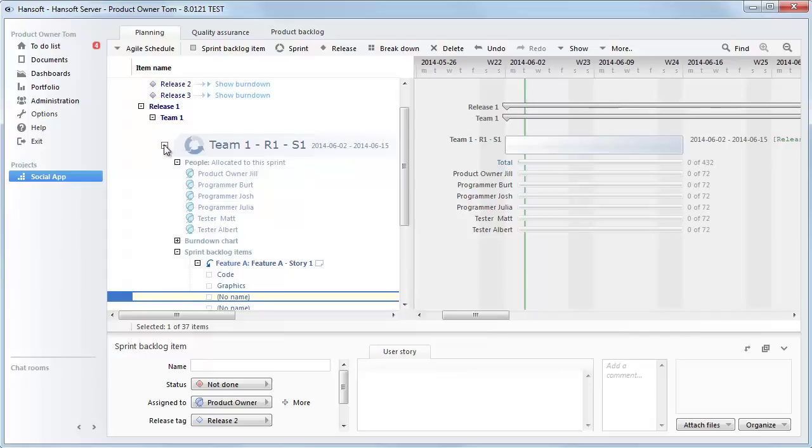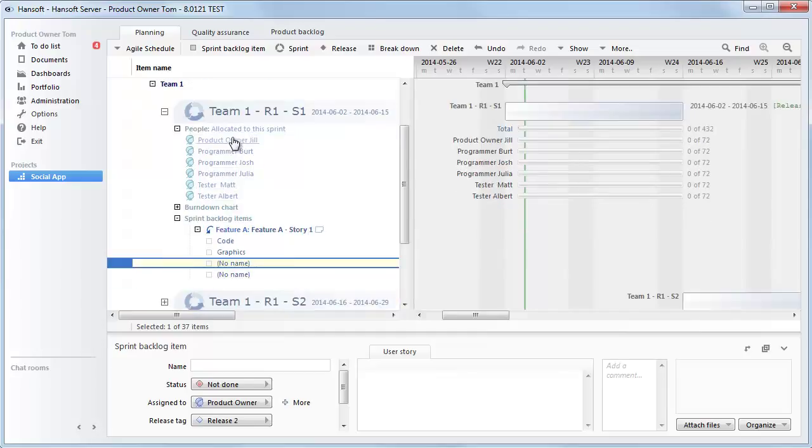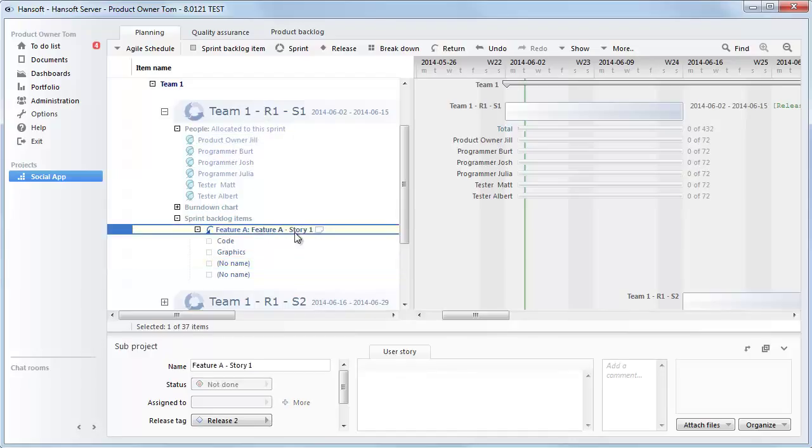Try to divide people up into several sprints so that you can keep a group size of around 7 plus minus 2 because that is a good decision-making group. And also, the second thing is when you have an intertwined organization where there's a lot of dependencies between people, of course, it is a tricky thing. But most of the dependency resolution should be done in the backlog stage. And at the sprint level, most of the items, dependencies, should preferably be resolved before that. So that if this team is going to work on feature A, story 1, they should have all the things ready so that they can actually work on it uninterrupted and not wait for other teams.